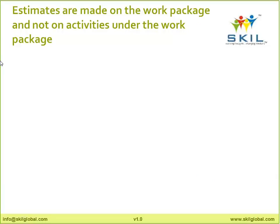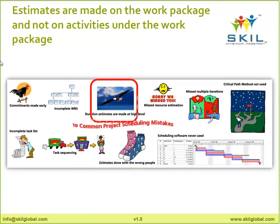The third problem: estimates are made on work packages at a high level, not on individual activities. The boss asks when you can complete, and you say 'about two months' based on a high-level estimate. If you use scheduling software but make these mistakes, no software on earth will help you do any intelligent analysis. Giving a good estimate is your job, not the software's job. But if you give a good estimate, the software will tell you: if you continue like this, you will delay the project by three days. The software itself has no brains.